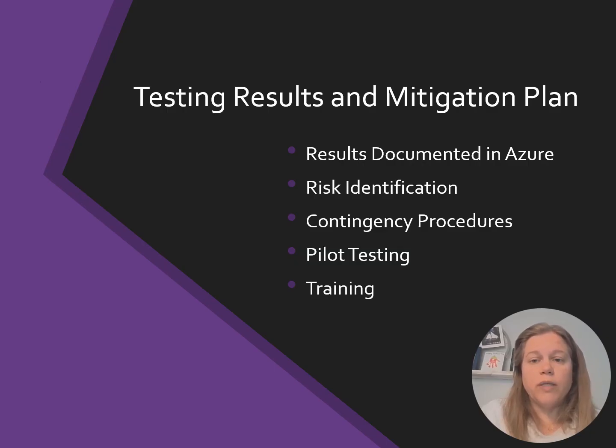Before testing, potential risks must be identified, such as incomplete data capture, workflow mismatches, or system integration failures. Step-by-step backup plans for common issues like system downtime, data access problems, or failed integrations will be developed. Pilot testing will be used to catch and address issues early. After each phase, findings will be reviewed, documentation will be updated, and implementation will be adjusted as needed. Training and support will be available during and after testing to quickly resolve user-reported problems.